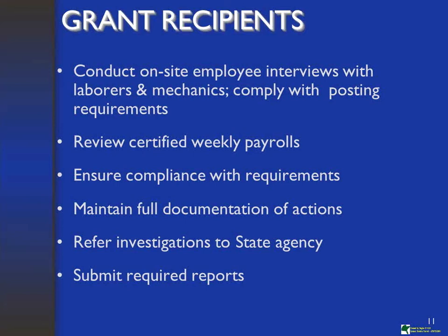There is no magical number of how many need to be done. It's an assurance that you have a good representative sampling of the contractors on site. So there used to be kind of a rule of thumb of 10%, but it's all relative to the project. Some projects are very lengthy, some are very short, and demand more attention up front.